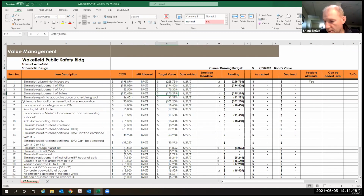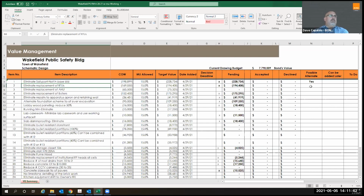So we need to check that because the rooftop unit in the estimate, RTU2, is 10,000 CFM. The memo that was issued says it needs to be 17,000. So we may not be able to just take that out. It will be undersized, it sounds like. It'd also be good to know, when that question gets asked, if the ductwork is still going to maintain the same size. I would kind of be surprised if it was.